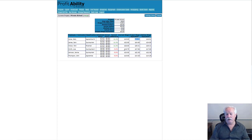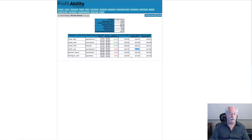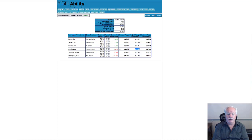You can see the bottom group had some struggles on their task. We don't know if it was rocks causing delay, a material issue, the general contractor being in the way, or lack of skill. We're paying this person $18.75 an hour but on that task they only earned $17.86 - that's a losing proposition that needs to be corrected. If it's just a one-task issue it's probably not a big deal, but if it turns into a trend that's a problem.